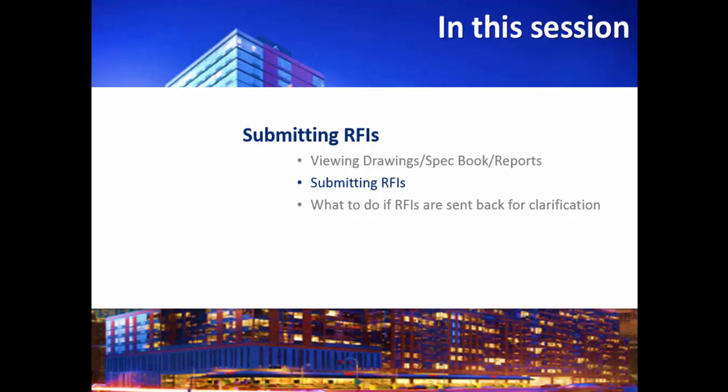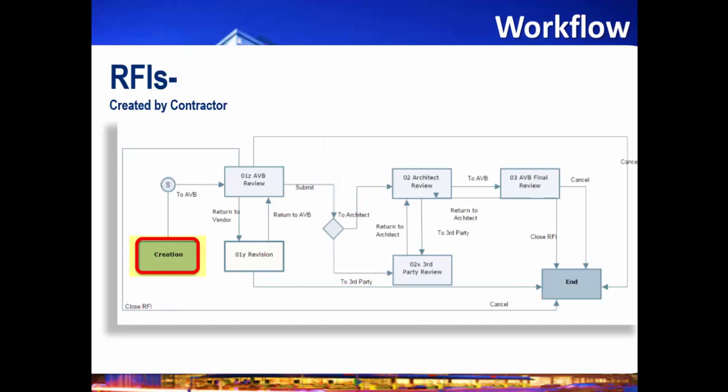Now for submitting the RFIs. RFIs are created by the contractor. They then come to Avalon Bay to review. If the Avalon Bay project team has a question, they may be sent back to you for revision. We'll cover that a little later.